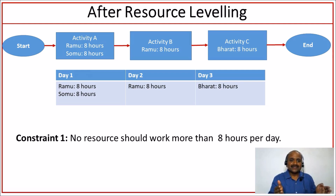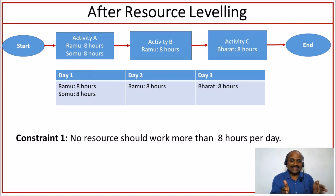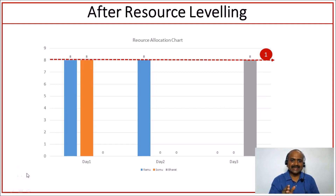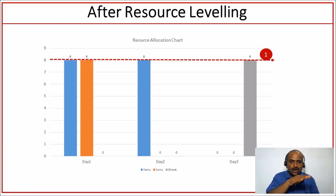Now what is happening? In order to honor this constraint, we are extending the project duration. Earlier, the project was supposed to get completed in two days. Now the project is getting completed in three days. So after resource leveling, the resource allocation shows Ramu, Somu, and Bharat are all assigned within eight hours per day. That's how we see resources are leveled.